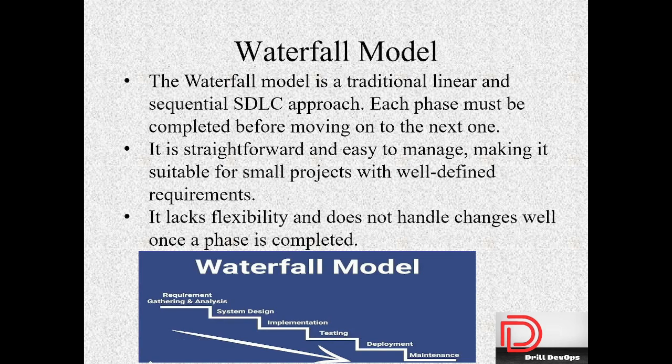During the implementation phase, the actual code is developed, and once the code is developed, only then does testing start. If you see here, the diagram itself shows it. It is a step-by-step approach. You cannot directly jump from the first step to the last step. All the other phases should wait until the previous phase completes. That is what the step-by-step process is.